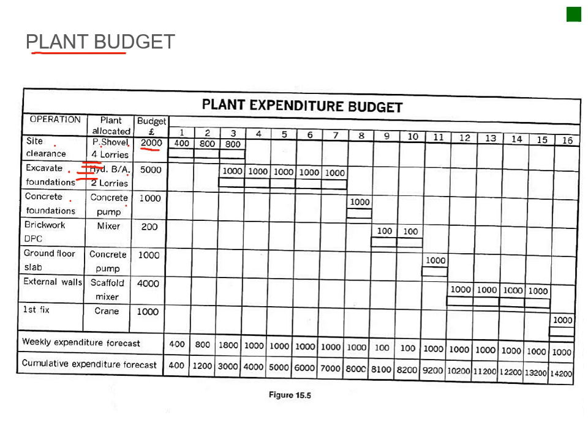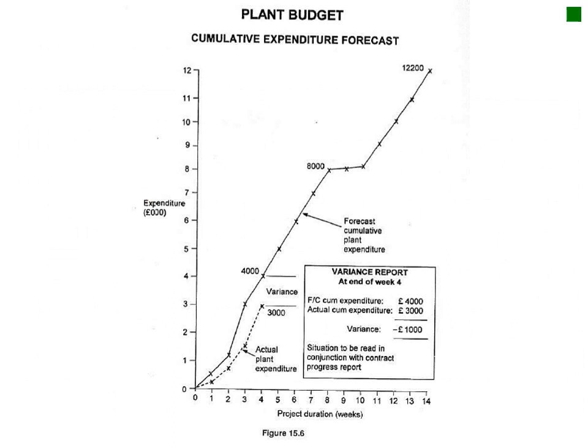In this case it's pounds, but let's say it's 2,000 rand, divided into week 1, week 2, week 3, and then you add that and you get your cumulative cost again, like we did in the previous lecture. Okay, and then you plot that again, and you can actually calculate your variance to that.